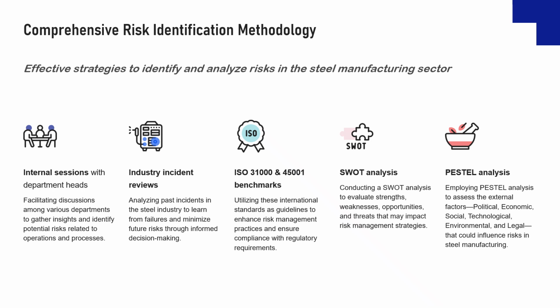Here we highlight the risk identification methodology. We used several methods to identify the risks, such as internal department reviews, analysis of past industrial failures, and benchmarking with ISO 31000 and ISO 45001 standards. Additionally, strategic tools like SWOT and PESTEL help uncover external and regulatory threats.